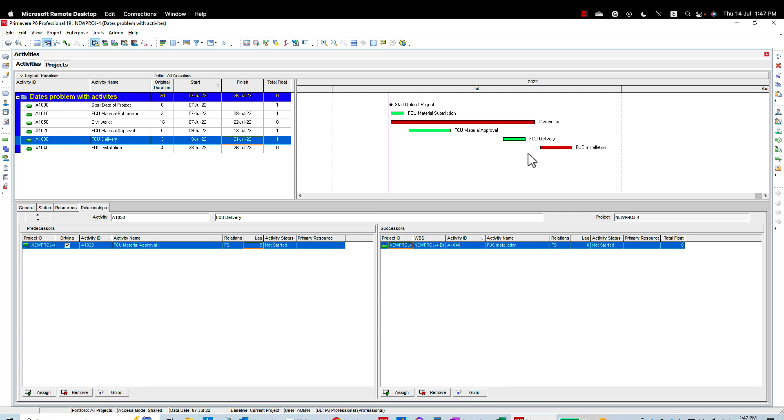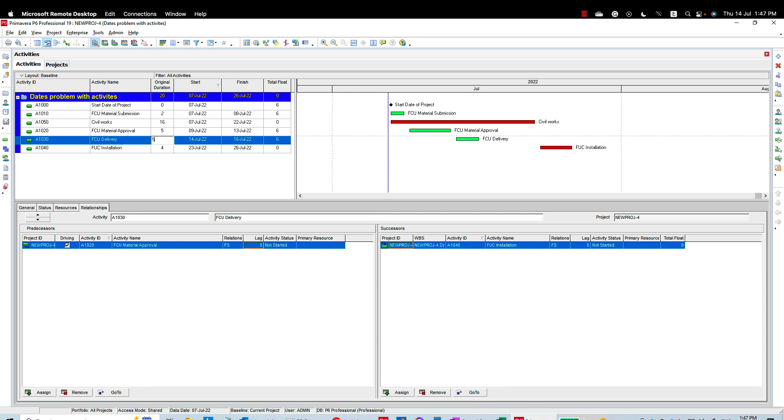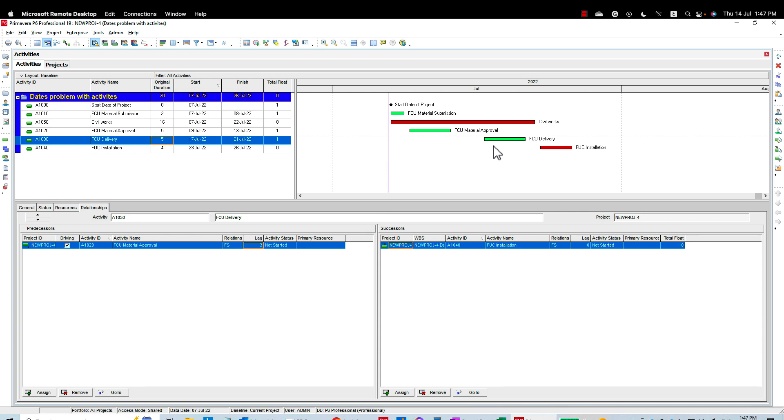My preferred method is a mix of two scenarios. So here I'm going to remove this one. What I could do, if I was doing this schedule, I would increase the delivery period a little bit. Let's say I'm going to increase it by two days, so I'm going to make this five. Then I'm going to shift it by three days. Now I have a contingency period here of two days. So if anything goes wrong in the delivery duration, I'm still on the safe side. And at the same time, I moved the start date of the procurement to the date I believe is suitable to the project.